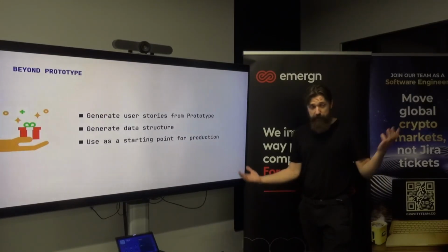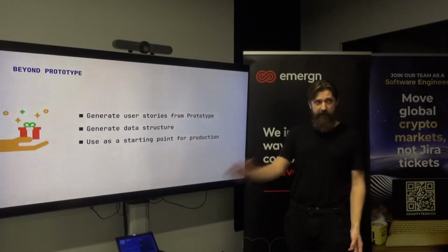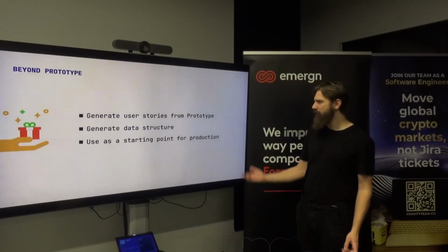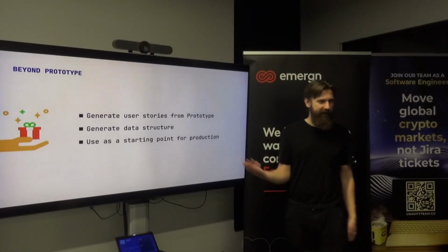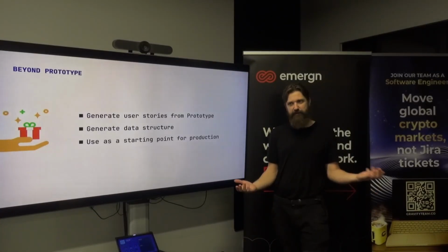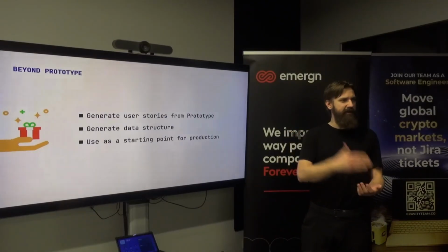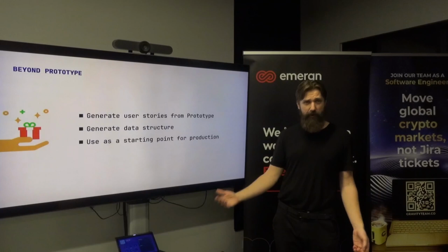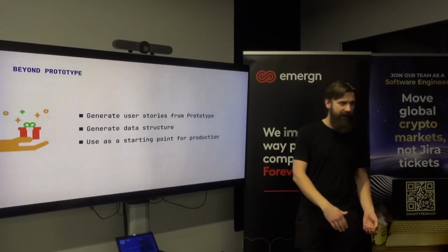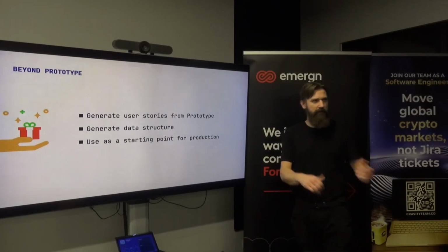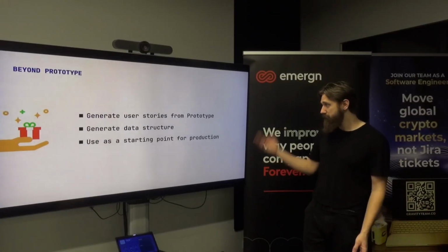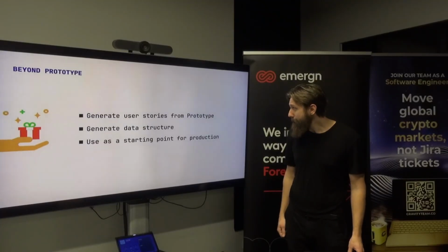Yeah, and also if you have built the prototype, it's not the end of what you can do with these products, right? One thing I like to do is, no one likes to write user stories, but we still need them to communicate the progress of the project. So you can just generate user stories from the prototype. You get it in an Excel sheet, you review it, it's all good, you import it in your Jira or whatever, and you have your tasks, tickets, right?